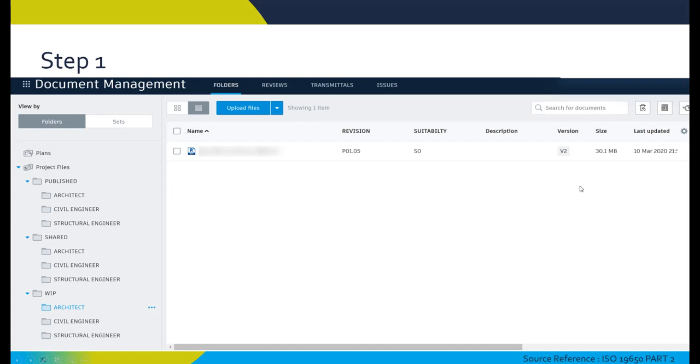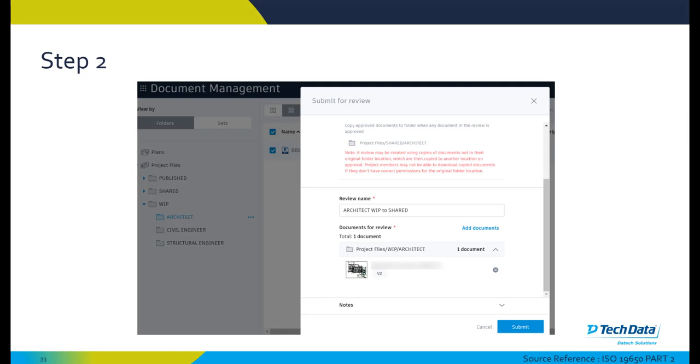To look at a second workflow, in step one if we have several WIP iterations of a Revit model by the author which are saved to the common data environment or BIM 360, we assign these a metadata status of S0. The Revit model undergoes a quality assurance check within that particular task team to review the container, not its contents, just the file naming against the project information standard. This refers back to the ISO clause 5.6.3. Then step two, the contents of the geometrical or Revit model go through a final review within the task team, so within the architectural team. The geometrical model or the Revit model in its native or in an open format is assigned an S1 status suitable for coordination only and released for sharing. The task team has decided not to export documents or drawings from the Revit model until the coordination review is complete.